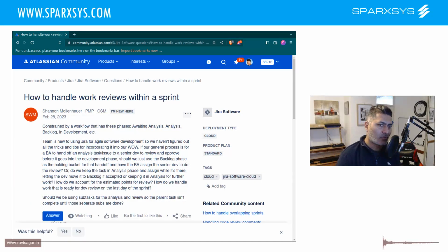Now, in Jira, when you're working on a board, of course, you have your status and your workflow that you can use to track different phases. But at the same time, your backlog will basically contain everything. From your backlog, you will of course pick some items and groom them, and that is totally okay. You can keep one backlog where all the new requirements go. From the backlog, you will work on the requirement, refine it, estimate it, do some high-level estimation, prioritize it, and then create your sprints.